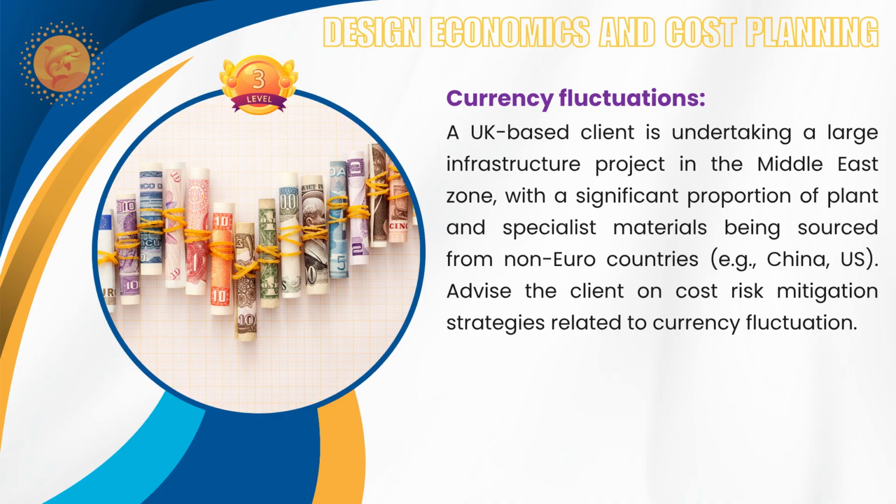The second one, contract strategy. Use a fixed exchange rate. That means you will fix something between your supplier and yourself: this will be the exchange rate, this is the fixed cost that you will pay him based on your currency. Already he has to quote to your currency, then you will be paying in that currency. It will be fixed exchange rates.